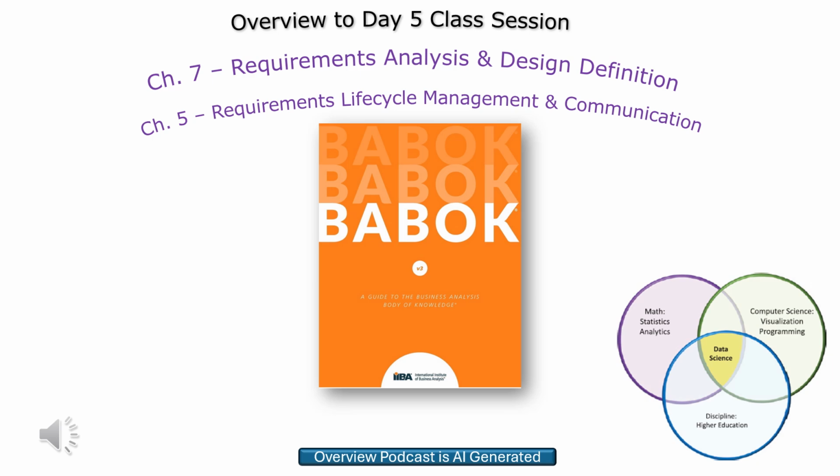And once you've assessed those impacts, it's time for impact resolution. Right. So what happens then? Well, this is where you develop strategies to address those identified impacts. If the change is approved, you might need to adjust the scope, the schedule, the budget, or resources. If the change is rejected, you need to communicate that decision, explain your rationale, and maybe explore alternative solutions. It's about managing those consequences effectively. So being proactive and having a plan in place. Exactly. You're steering the ship through those choppy waters of change.